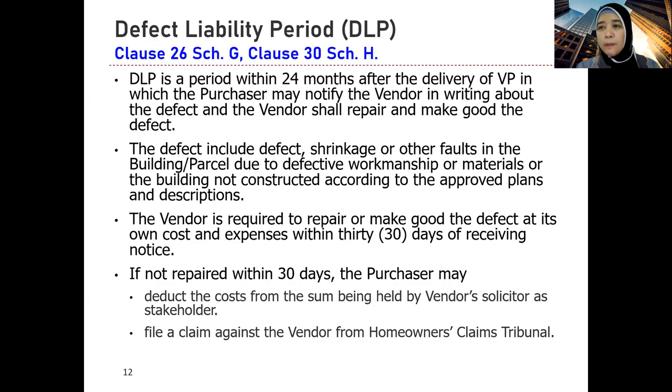So ada two things must happen there. One, the purchaser must notify in writing. Dia mesti bagi satu notis bertulis. Must notify in writing that there's a defect and I require you, the vendor, to come and fix, to come and make good. Kita panggil fix or make good lah. Memperbetulkan ataupun memulihkan. Kalau tak ada, ada kan, that is make good. Sebab sometimes the defect tu is not because of retak ke apa.